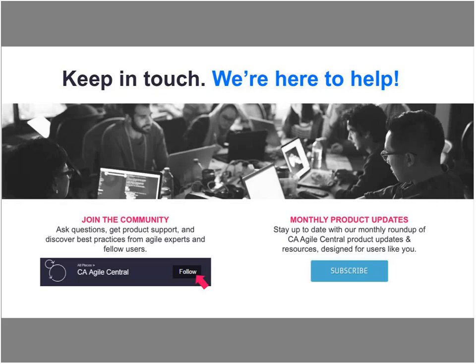So one of the questions is, and I'm not quite clear, but here it says, will the red lines on the page show up, or do we need to click to make them visible? I'm not sure, but if we're talking about the dependencies, yes, the red lines will show up. I don't think you're talking about the portfolio timeline, but as you click the dependency icon, it'll automatically go to everything that's been set up as a dependency, either a successor or a predecessor, as I showed in the portfolio timeline. Whatever you set that up as, you'll see those red lines connect them.